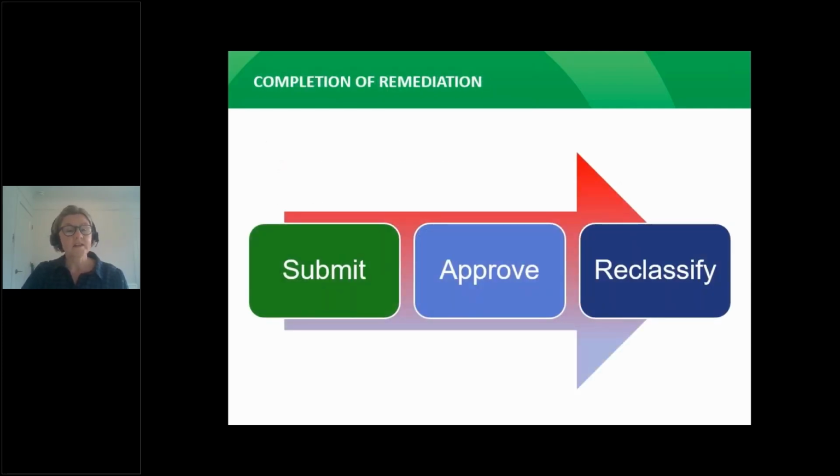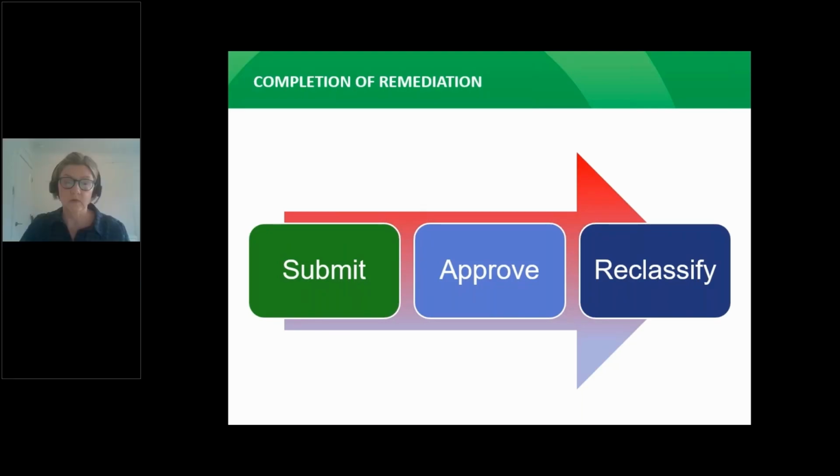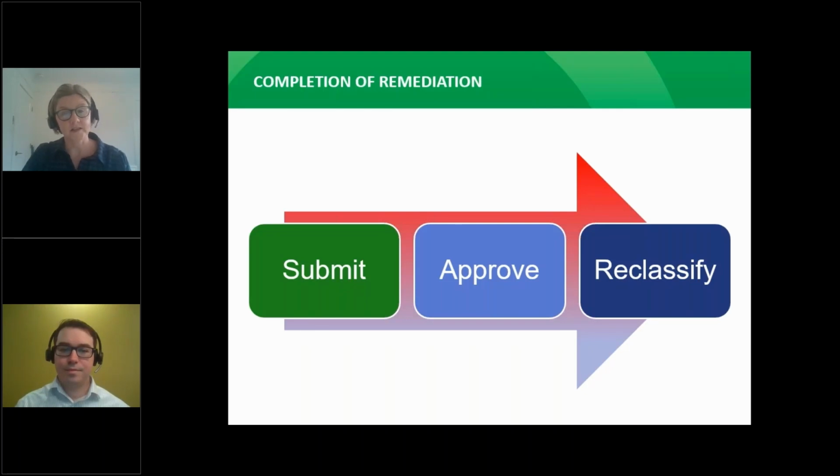So once remediation is complete, the responsible person submits a completion of remediation report for remediation of the high-risk conditions. This report will then be reviewed by the ministry team, and a statutory decision maker will decide whether the site can be classified to either a non-high-risk site or a risk-managed high-risk site. And now I'll pass it on to Evan, who will talk more about this site reclassification.